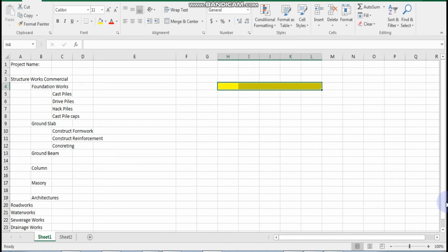And if you delay and you don't get extension of time, there will be a penalty normally in terms of liquidated asset damage, which we'll explain a lot more when it comes to end of the semester, whereby we're doing a bit of contract management here. Okay, so we have to understand this is how a bar chart looks like, and it has so much implication here, you see. So how do we successfully draw this thing?